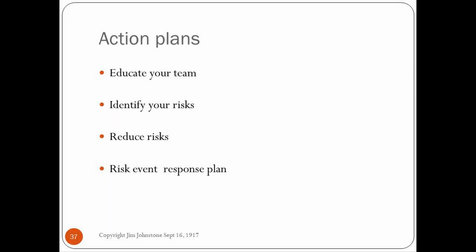Okay, what can you do with this information now to help your company do a better job of managing risk in the supply chain? Well, the first thing you can do is educate your team. And if you want to look really smart to your team, you should tell them you've got to do a couple of things to make this even possible to get it done at all. One is you have to reduce the scope. It can't be done on every part. You want to separate the trivial from the critical few. So get it down to the few critical parts, the few critical services that make your business go, whatever it is that defines your business. That's what you've got to focus on.